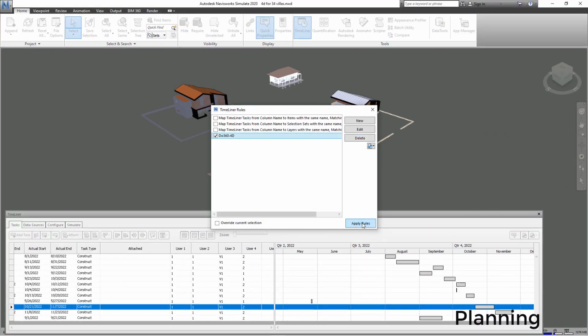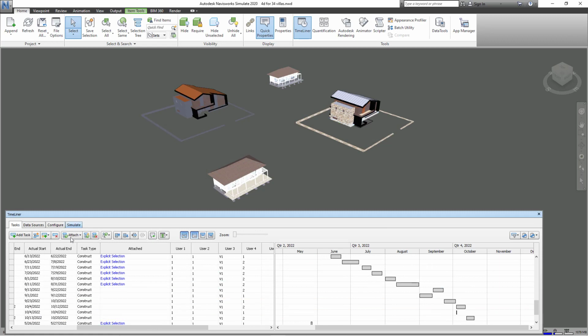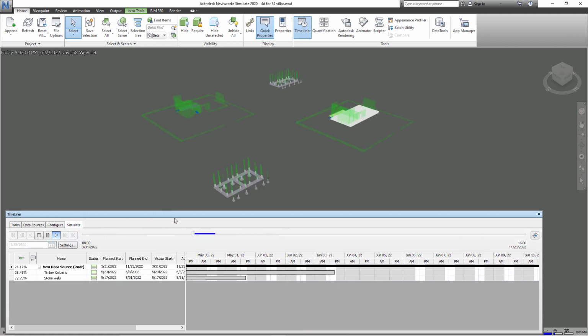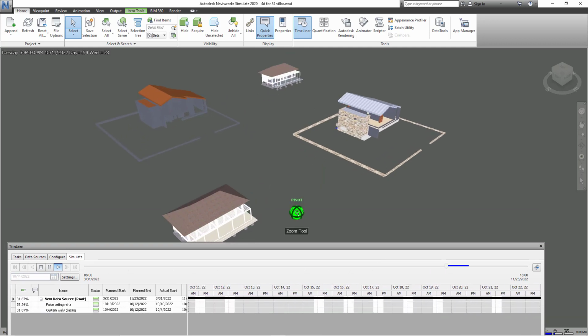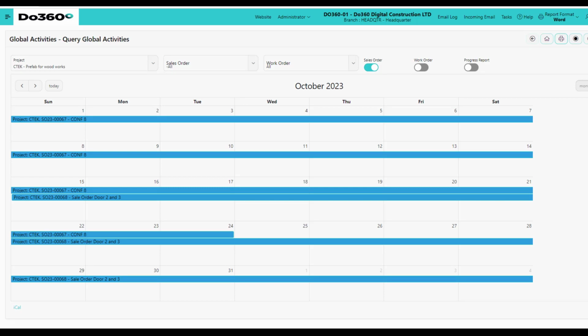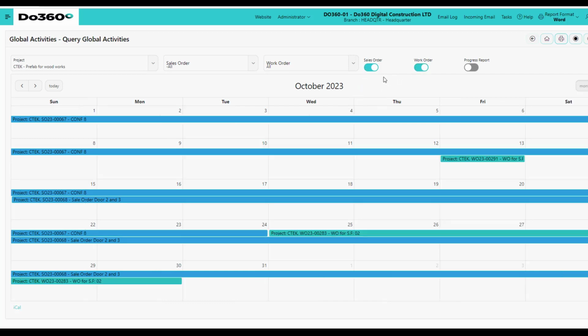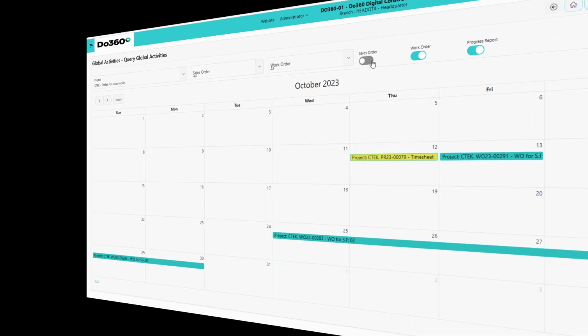Building on this rich information, the project planning team uses the innovative 4D math modeling technique to link every single item of the project to the Primavera plan, then automatically loads all the construction and logistics resources for a cash flow analysis. Meanwhile, the plant operation manager plans the manufacturing batches in alignment with the required prefab installation plan. The manufacturing department can thus track each batch schedule, its detailed work order deadlines, required machine time, as well as the progress of each semi-finished production.